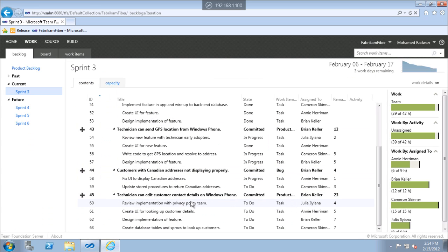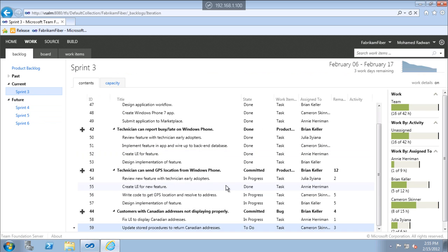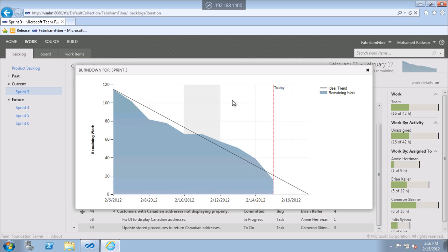I will show you. If we go to see this PBI for Brian Keller, it is not started yet, so maybe we can move this to the coming sprint, and this will be reflected if we open the backlog. Because the Burndown, we monitor the Burndown so we can know how our sprint is going to work. So at some point we maybe need to drop some user stories. I believe if we are about to deliver 10 user stories, we may deliver 8 or 9 user stories but completed. And there is a lot of talk about definition of done, about the work being done. So delivering fewer user stories is better than delivering all the user stories without completing each one. So this is very important here in Agile development.